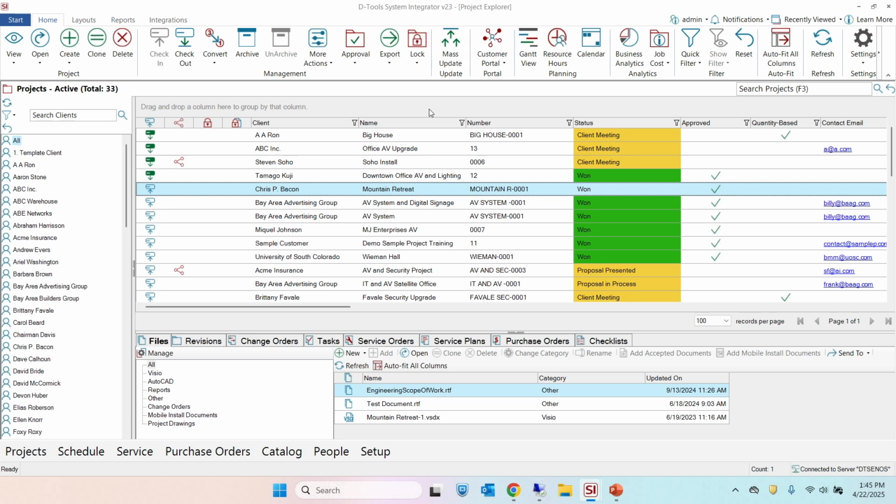When one of those four actions takes place, count it towards job costing. And we made labor only count towards job costing if you have approved timesheets for that project. That's what would count towards your actual hours and the cost.